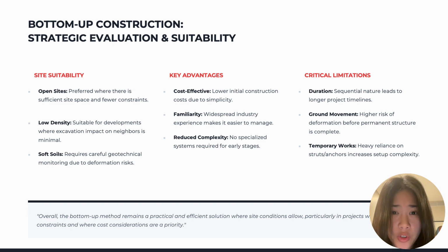However, in soft soil conditions, careful monitoring is required due to the risk of ground movement. The main advantage is that it is cost-effective because the method is simple and does not require complex systems. It is also widely used in the industry, so it is easier to manage.